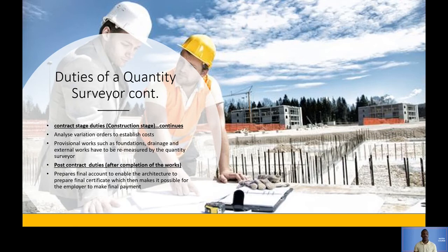And then post-contract duties. Now, this is after construction has been done, the building is complete, everything is done. So he prepares a final account to enable the architect to prepare the final payment certificate.